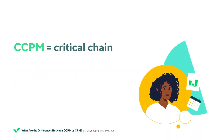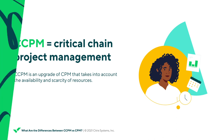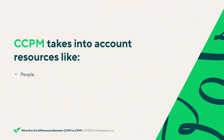That's where Critical Chain Project Management can be applied for a more realistic result. CCPM also uses an algorithm to determine a project's schedule and is viewed as an upgrade or extension of CPM that takes availability and scarcity of resources into account in addition to task duration and dependency. Those resources can include people, space, and equipment. When scheduling a project using CCPM, the goal is to keep resources leveled, so activities need to have flexible start times.